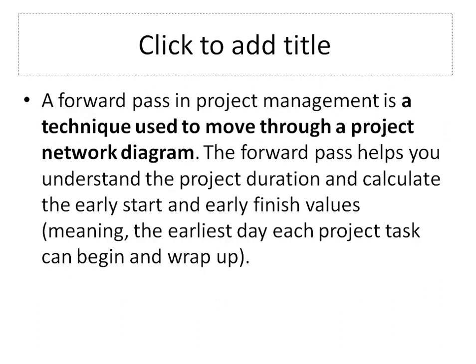The forward pass in project management is a technique used to move through the project network diagram. The forward pass helps to understand the project duration and calculate the earliest start and earliest finish values, meaning the earliest day each project task can be done.